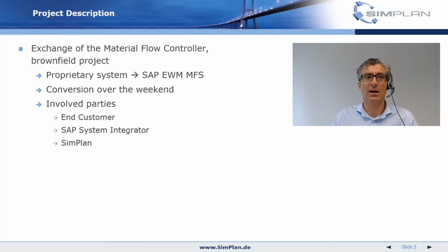And we see many companies transferring their systems from proprietary systems to EWM. As it is a standard, there are different system integrators out there in Germany, so they can also change their supplier if they are not happy with the former one. The conversion should happen over the weekend: stop Friday 6 o'clock and start Monday 6 o'clock. So quite a risky project, as you do not want to interrupt the production for a longer time.